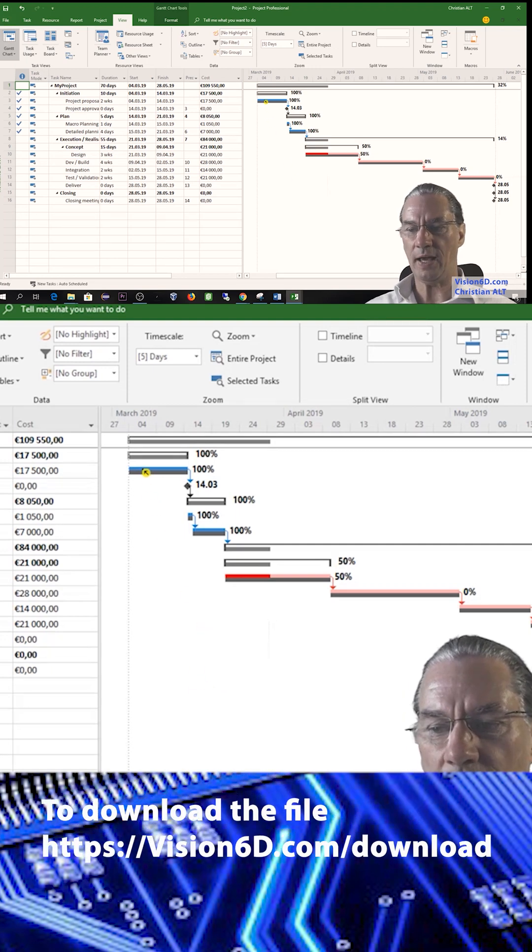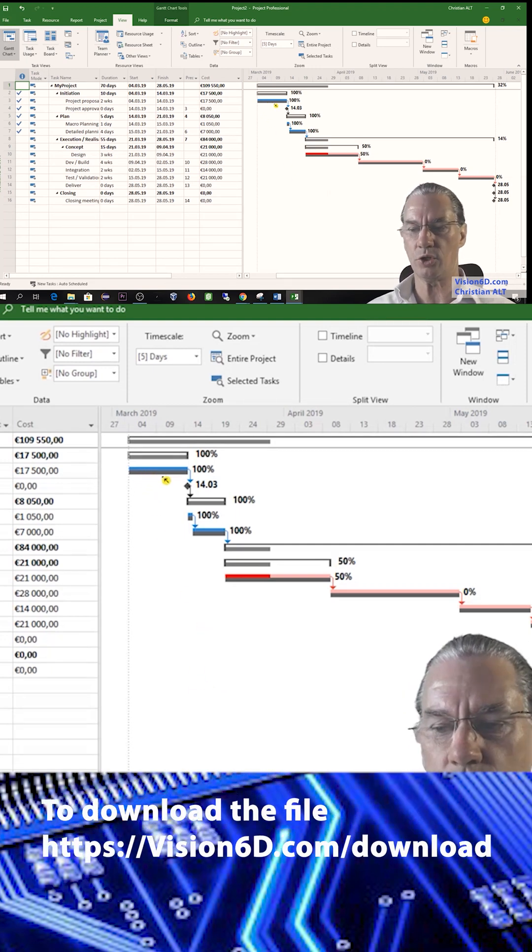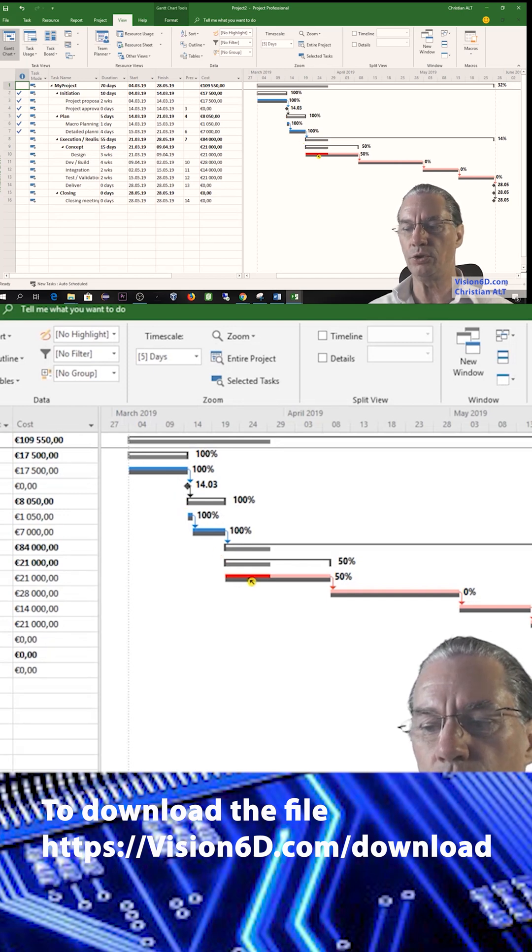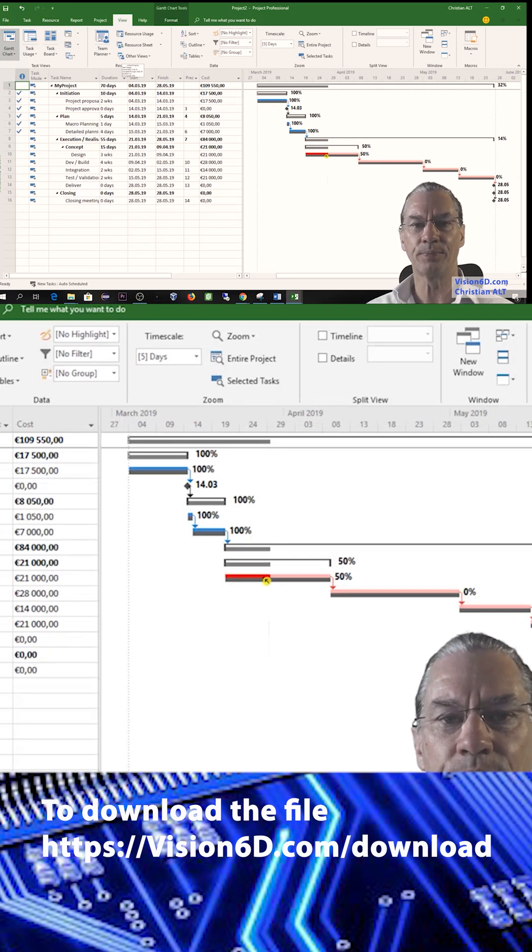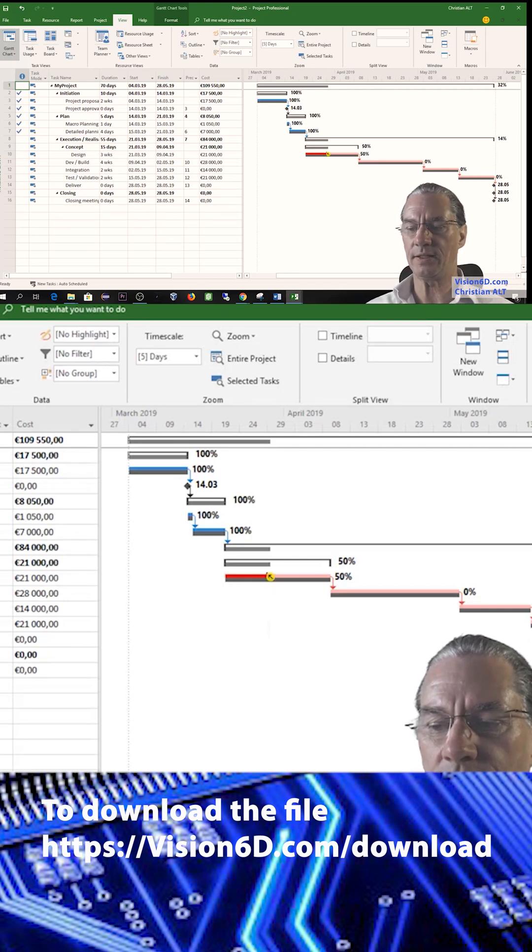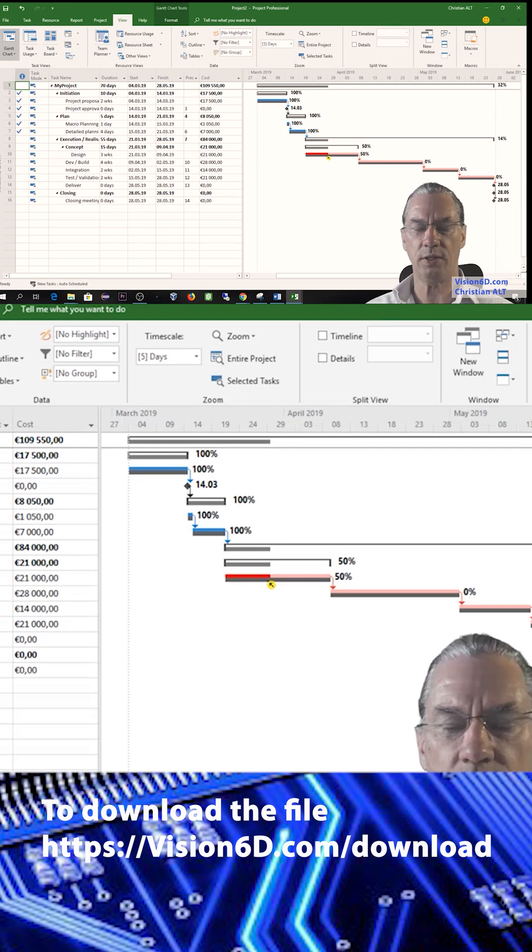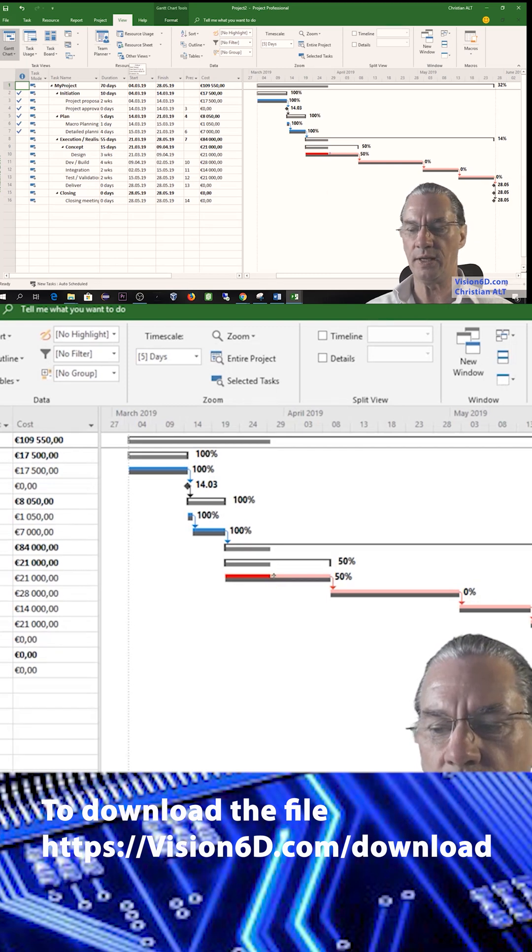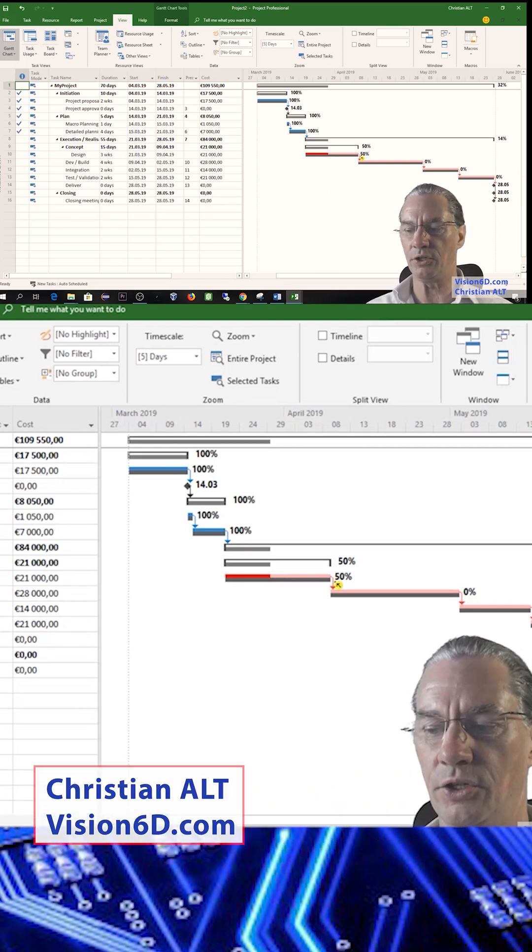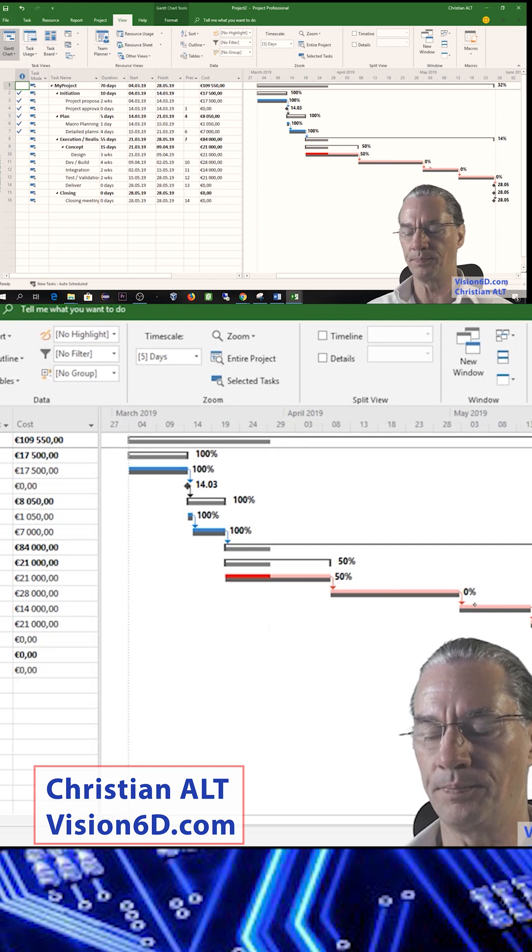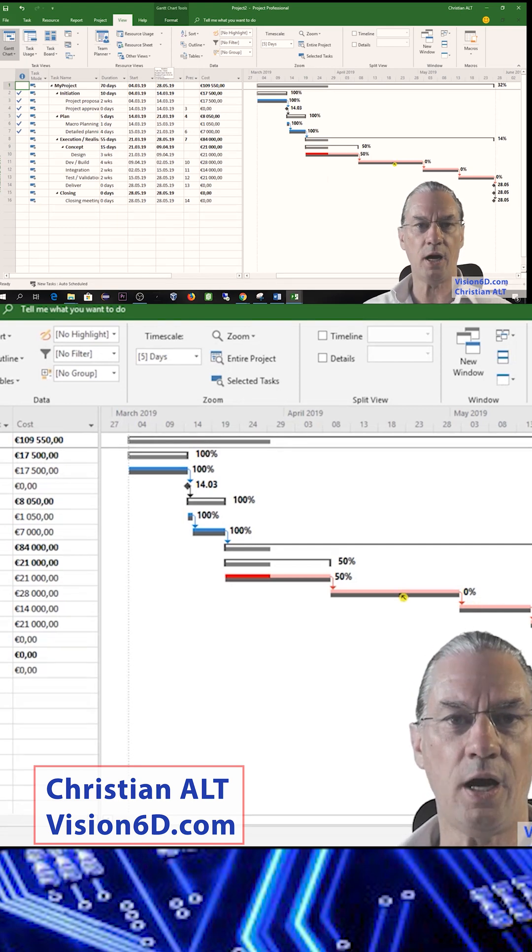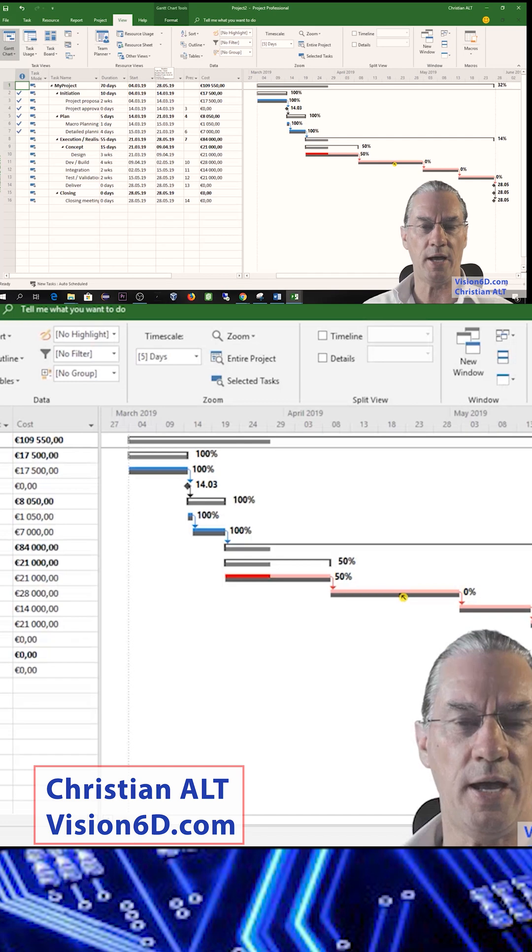We have the blue bars, we have the gray ones which are the reference, and we have now here new ones which are dark red. This is saying that this is what we have accomplished in this project, and the remaining is here in the lighter pink. The pink color is showing with the red color what is on the critical path.